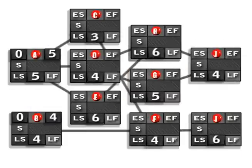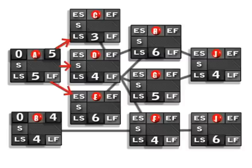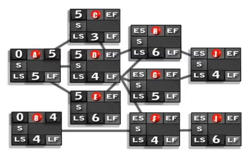Now we want to calculate what the early finish time is going to be. To calculate early finish, we're going to take early start and add the duration. So zero plus five, and zero plus four. Now we're looking at this diagram and we see out of activity A there are three arrows. We automatically know that the early start for each one of those activities is going to be five. We calculate the early finish: five plus three is eight, five plus four is nine, five plus six is eleven.